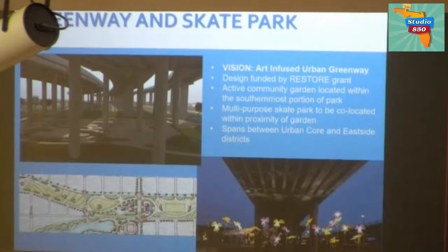But anyway, I'm Terry Berry, and I'm with Escambia County, and I'm the project manager for Hollis T. Williams. And so we are extremely excited to get this project going. And I have issued the notice to proceed to our engineering firm that was selected, which is HDR Engineering. And they actually started on July 15th, so just within a week. And then this week, actually on Thursday, we'll be having our official kickoff meeting with the team. During that kickoff meeting, we will be going over all your roles and responsibilities, talking about schedule and those kinds of things, and trying to get the project going.